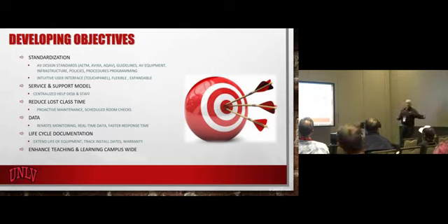Do we need to continue to invest in that? Because anytime you change one component in a room, like that new document camera, you almost have to multiply that by 160. So it's not just a $1,000 thing, it's a $160,000 thing. So we keep those standards based. Now, departmental rooms have different technology in them specific to them, okay? But we keep a baseline for all of our classrooms. So we were looking at the standardization.